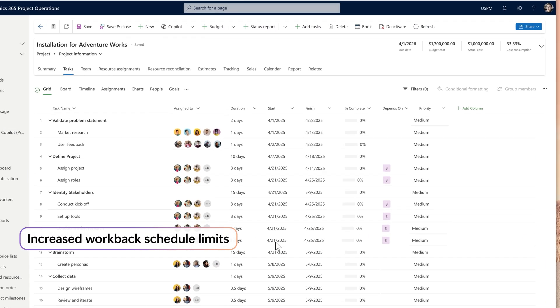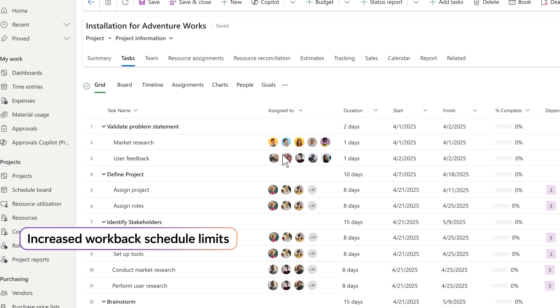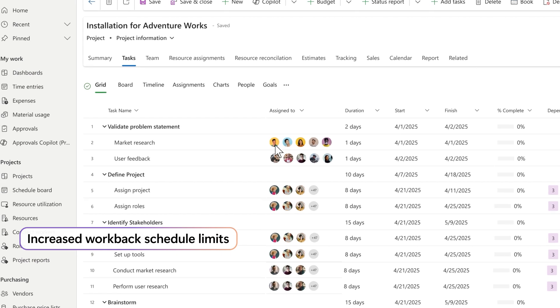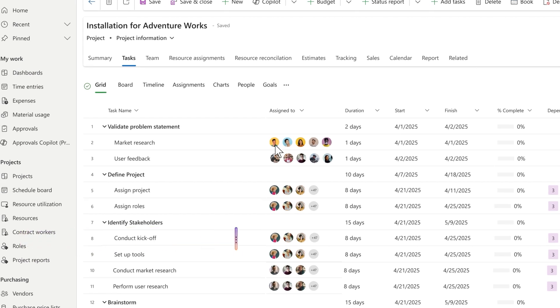It's an incredibly complex renovation project involving thousands of tasks and hundreds of project members. Work-back schedule limits have been expanded to 3,000 lines,